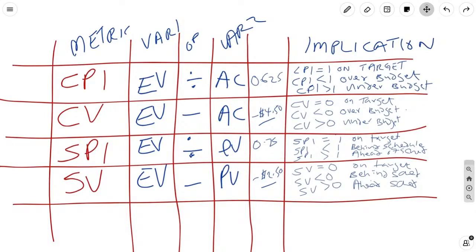We're working a project, and management took a look at the earned value metrics, and they said, knowing the kind of contract that we have, there is no way your cost performance index should be a 1.25. Why is that? Well, the work that we're doing is a level of effort project, and there's no way you're putting in more effort than you should. It's a level of effort. It's straightforward. We're paid by the hours. We don't go over the hours by contract. So if we have been doing that, then there's something wrong.